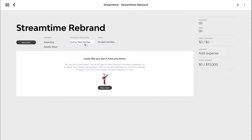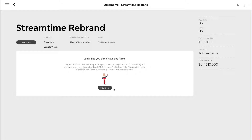We can see our title, our contacts, and some basic financial information at the top. At the moment we've got a budget of $10,000, nothing invoiced, expenses and so on. Down here is where we're actually going to be creating our plan as well as our quote — it's a done-in-one scenario. We want to create the job plan, type in descriptions, put in our hourly rates and figures, get together how much we'll need for this job, and then turn that straight into a quote.